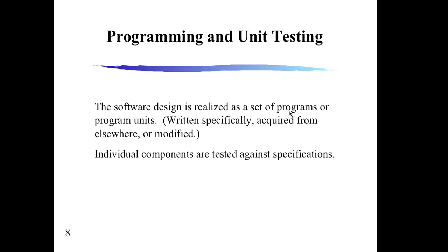It's risk assessment and risk management and planning. Imagine you have invested millions of dollars into this new EMS system. It must be out for fall 2011. You have one team working on it, and you have one implementation of it. You're putting a lot of risk into that team. If you have two teams working on it, one of them might finish before the other one. One may not ever finish. But you have more options. You're leveraging your bet that you're going to actually have it delivered on time.